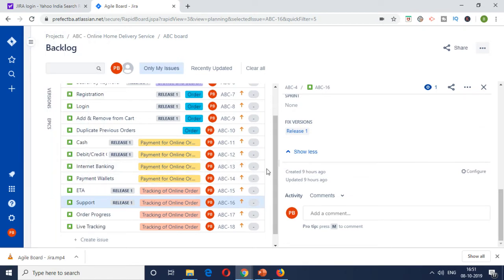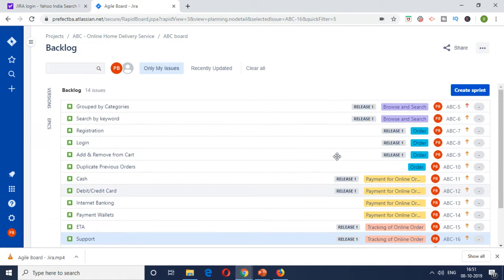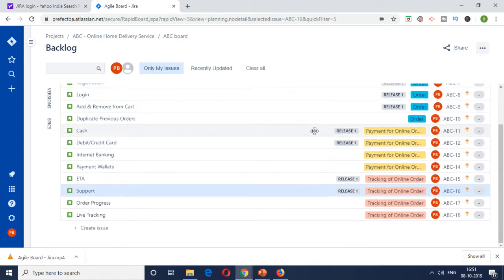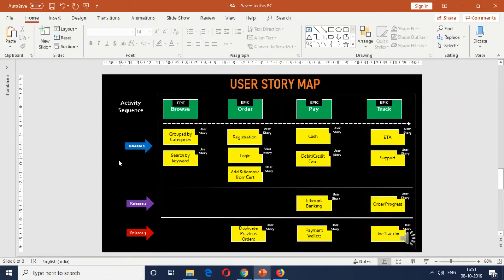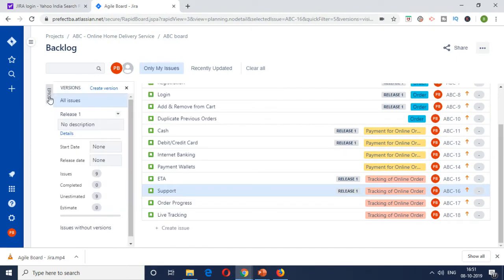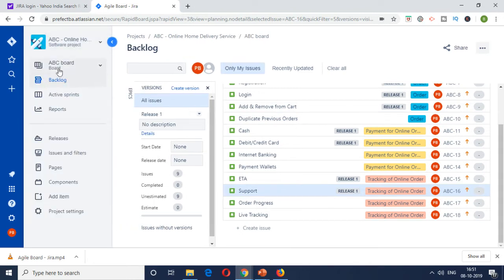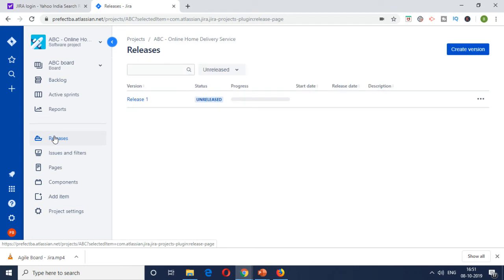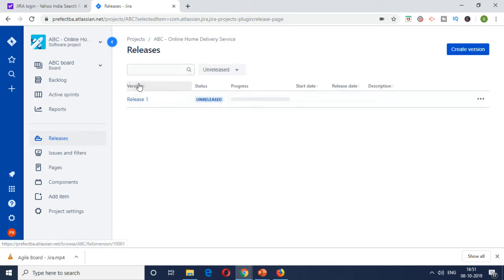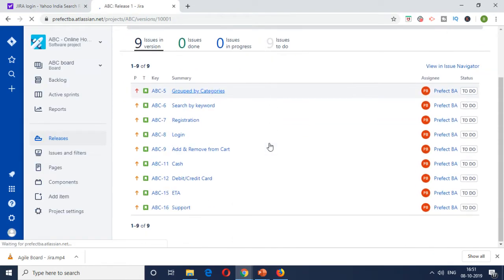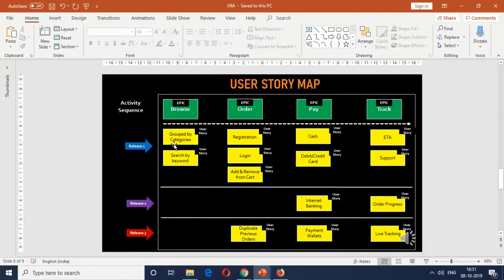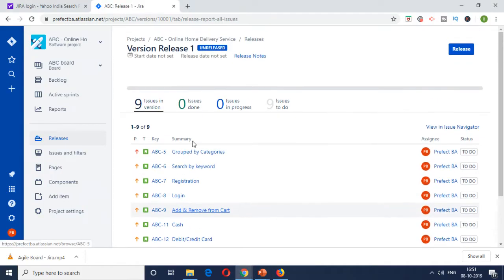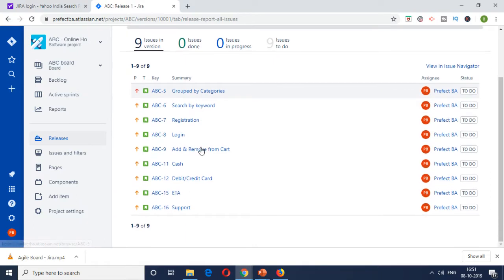So now what this gives you or gives us is basically, we have the complete product backlog, but we have tagged the MVP items, which is release one. So if you're going to look at all the items which belong to that particular release or for tracking, you can go to the releases tab here. And if you see here, now we will have something called release one. So this is what we have created. So if you click on this, you will be able to see all the nine items which are as indicated in the user story map, all of them belong here.